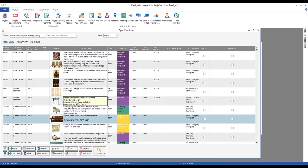Having the ability to compare estimate versus actual cost is extremely important when reviewing project cost analysis to determine where we may not have achieved our desired profitability. By entering an estimated cost versus actual cost, we can see on a per-item basis where we achieved a lower or greater markup than we had imagined.